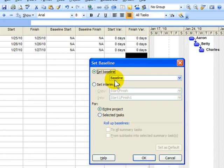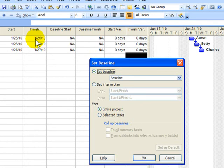When I do that, I want you to notice how the columns baseline start and baseline finish will be populated by the current start and finish dates that you see in the columns on the left.